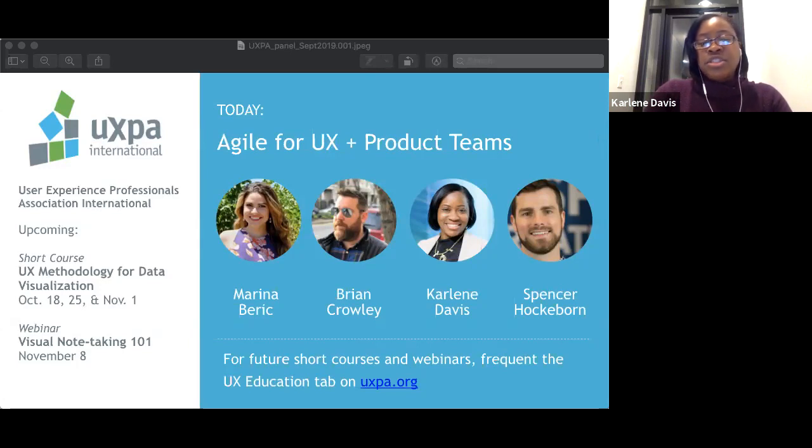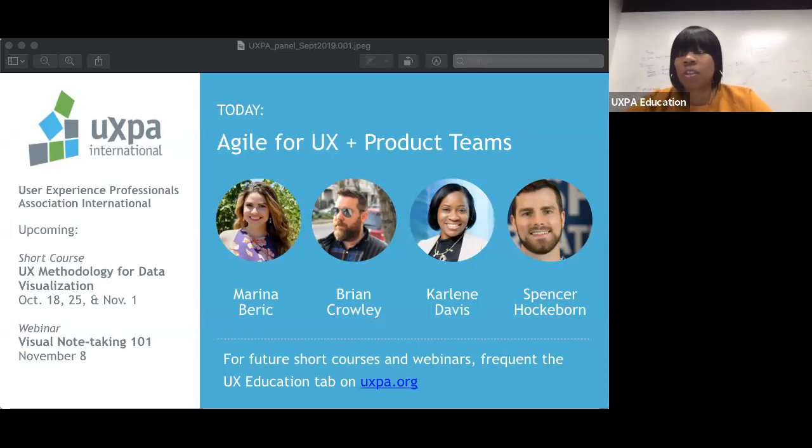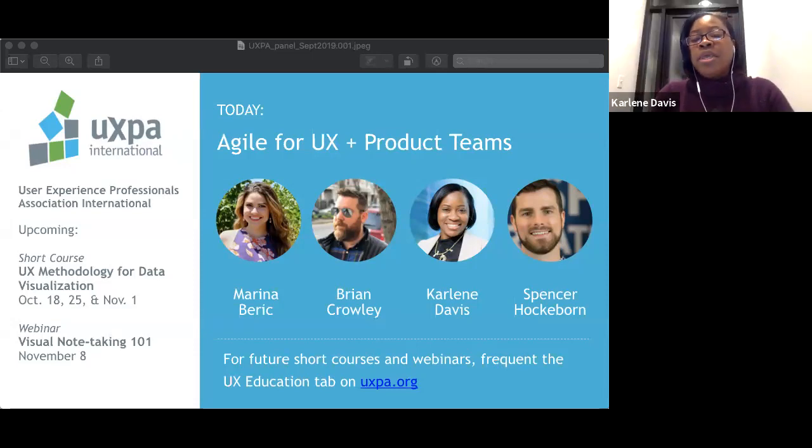Generally what happens is that you try to get at least one sprint ahead. So initially, to answer Shane's question, it is heavy lifting up front where you're putting in a ton of hours initially to get ahead. So you're working on product, design and all those other things, just trying to get ready for sprint 2. And as Carm had alluded to, there may be an opportunity where all the designs may not be ready for the sprint, but that's where the synergy of the team comes in. If the developers trust the UX person and you have this relationship and the assets are going to be delivered by a certain time, that's totally okay.